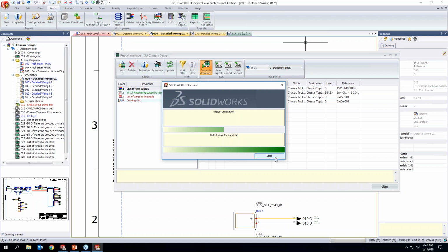It's taking all that information and dropping it right into these reports, so we don't have to sit in front of Excel for a week straight making sure we've ordered all the parts. Having worked in Excel myself, I've forgotten a part, and then I find out a week later that, oops, I need that part, and there's a 6-week lead time on it. So this alone might help alleviate some of that pain.